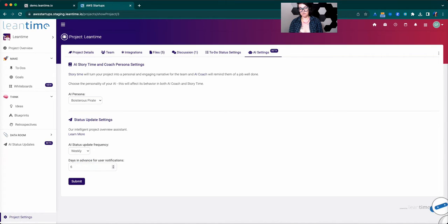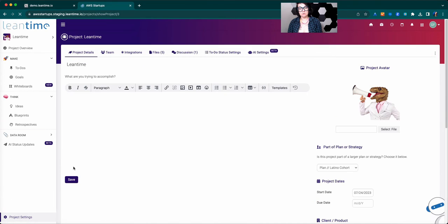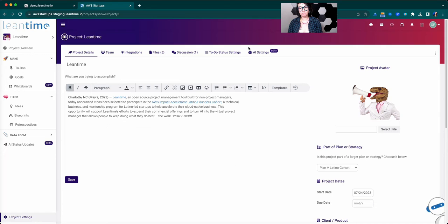So if reports are generated, or assumed to be generated right now in its current state, on every Friday, and I want to give 3 days in advance for users to go ahead and update their tasks, this will then update on, I think, Thursday, Wednesday, Tuesday. So your team and whoever you need to update tasks will see their notice on that time frame.